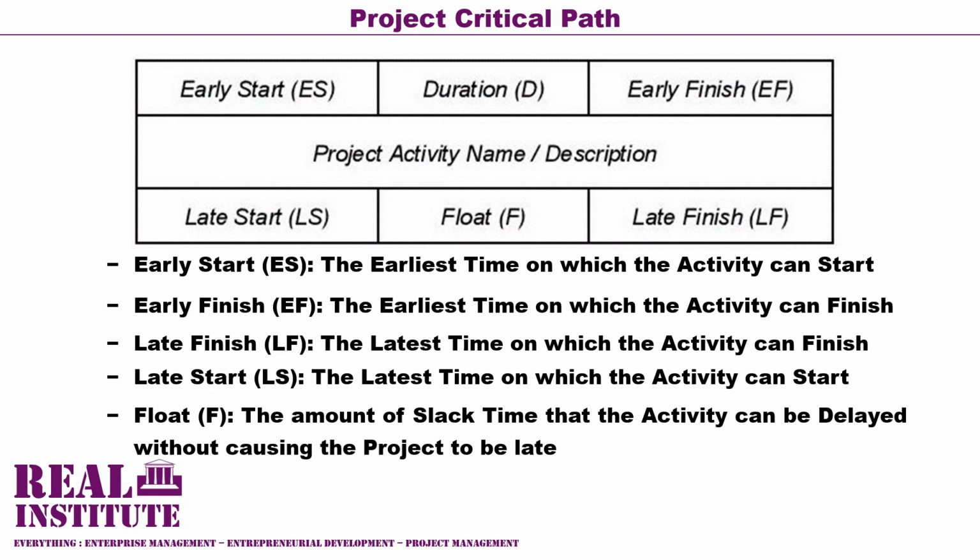It is impossible to start a project activity before its early start date because it is dependent on its predecessor activities. Also, finishing a project activity after its late finish becomes detrimental to the start of its successor activities and thus messes up the timing of the rest of the project activities and eventually the total project time or the feasible project duration.